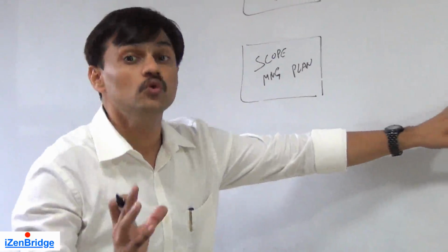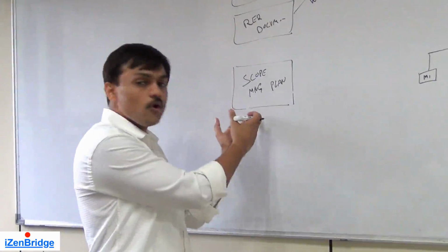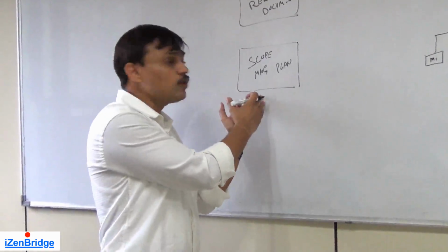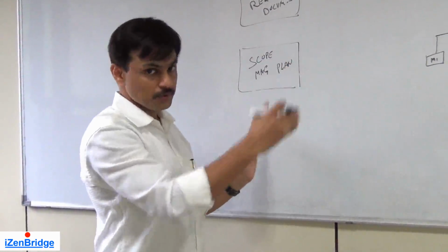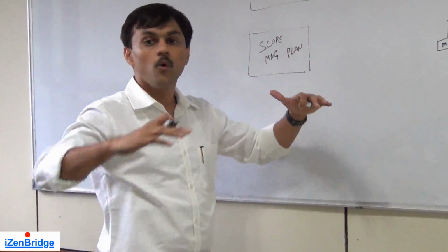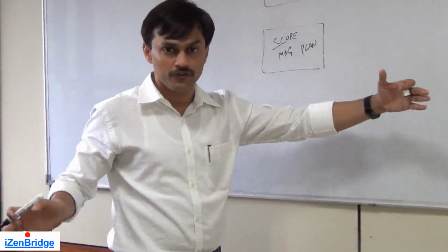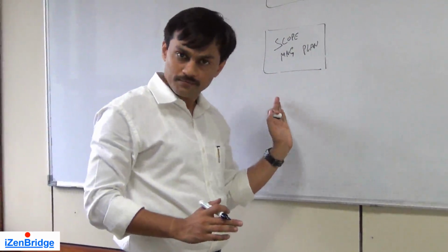For you to control the quality of their work breakdown structure, this is the only tool. Here you tell them they need to follow this approach and go to these levels, and then in the complete project, whoever is making the work breakdown structure in their respective modules, in their respective geography, follows the scope management plan.